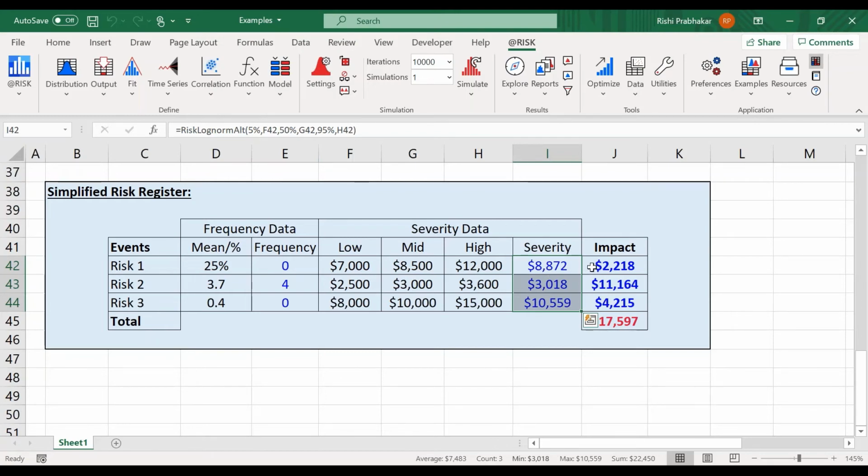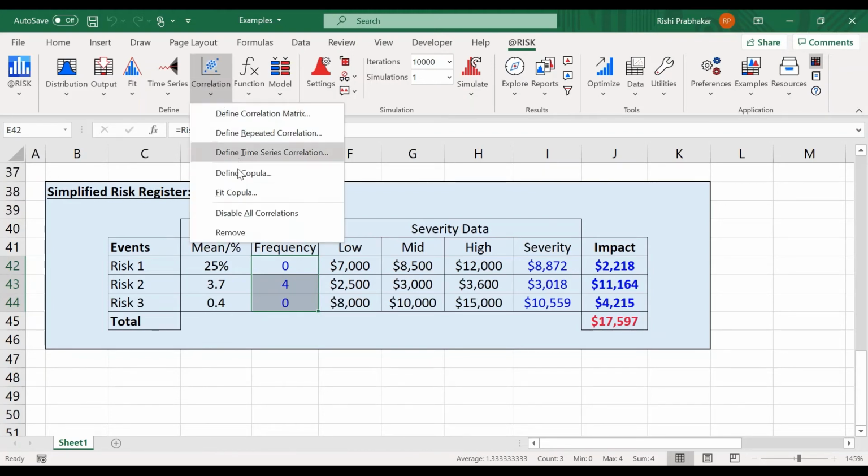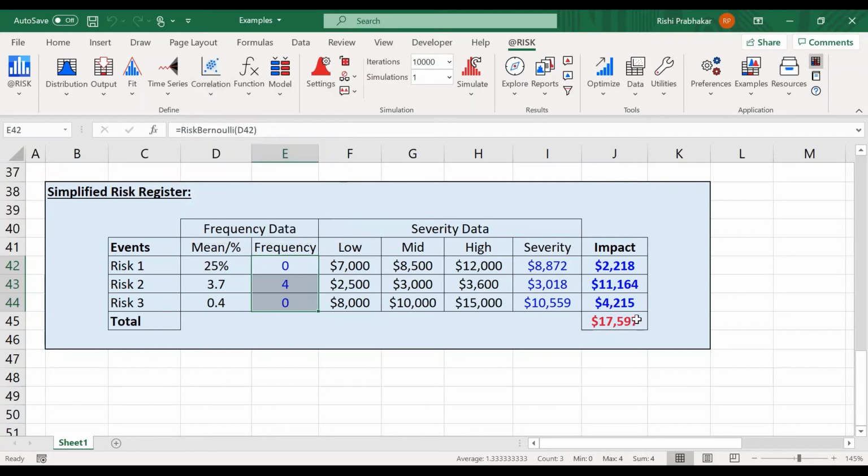Now, with that said, there are fancy ways of building your model such that you can, in fact, correlate the entire risk. So this sum would include these risks being correlated at this level, but it's an extra step of complexity. But in a simplistic way, any of your frequencies could be correlated, be it with matrices or copulas. And then you would know that the sum there is therefore more realistic because the relationship of the propensity of these events to occur has been included.